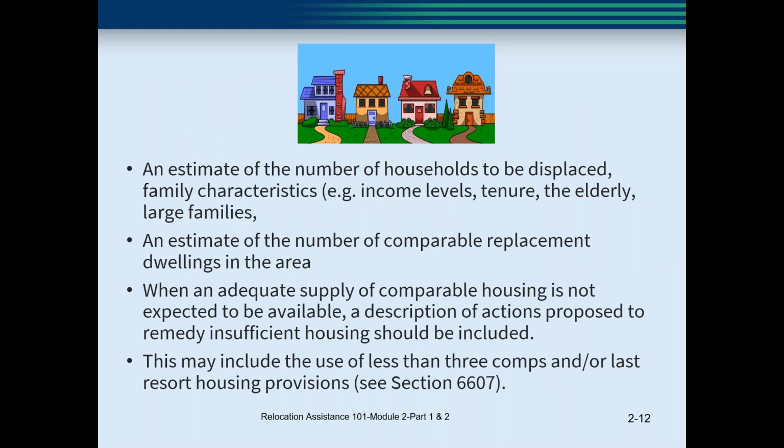So what are you looking for to put into this report? You're going to estimate the number of households to be displaced, the family characteristics. You're going to estimate income levels. Do we have elderly? Do we have large families? You're going to estimate the number of comparable replacement dwellings in the area.